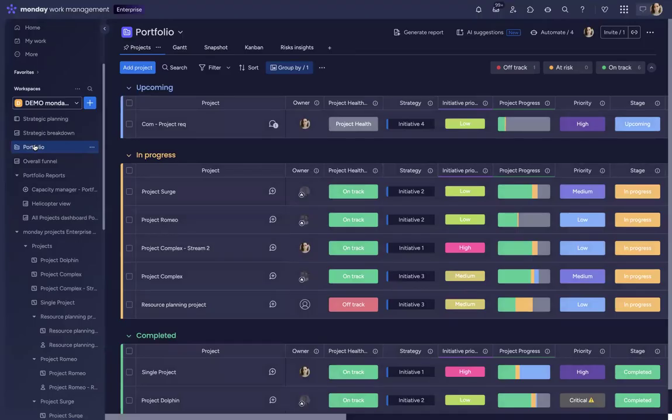Many companies work with project portfolio tools, so you can just understand which projects are linked to which tasks and which tasks are without a project. Here you will be able to understand the distribution of the tasks between projects or the tasks without a project. If you have some tasks without projects, then you already know that those tasks cannot be linked to strategic initiatives. So you'll be forced to understand why those tasks are there, and maybe those are some routine or operational tasks, but anyway, the volume of operational tasks should be transparent and understandable.